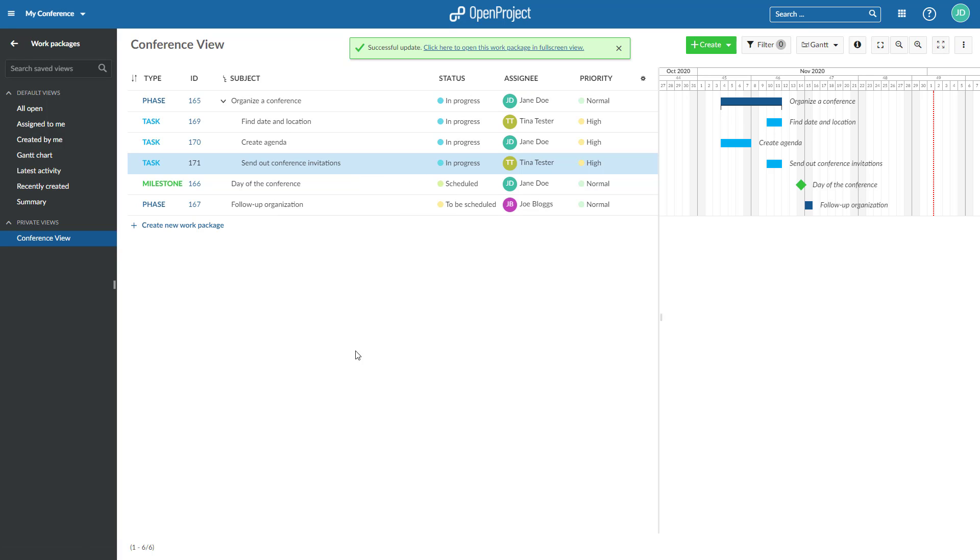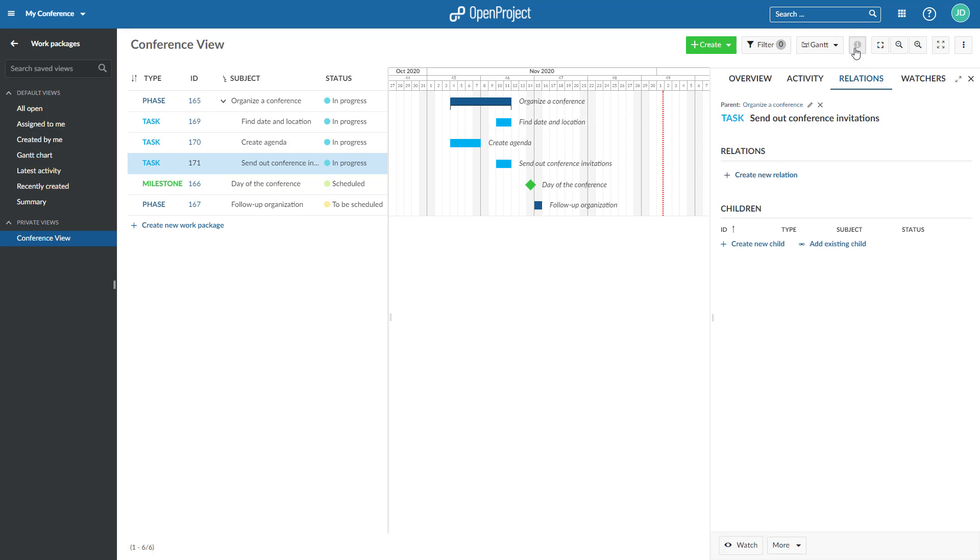To edit or remove the parent of a work package child, open the work package. At the top of the details view, you will see the work package hierarchy. Click on the Edit or Delete icon to change the work package parent.